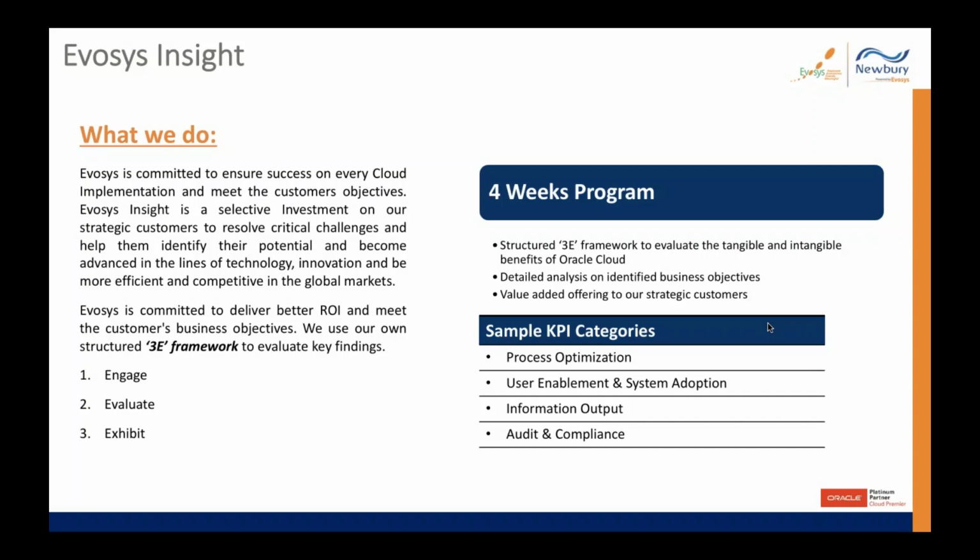We don't stop there. We also tie some of our payment terms to the realization of these KPIs, meaning our final payment milestone is not at go live. Let's say we mutually agree that we want to review whether you got the benefit of the KPI after 6 or 9 months post go live, we will keep some money on the table. So we are really talking about keeping our skin in the game.